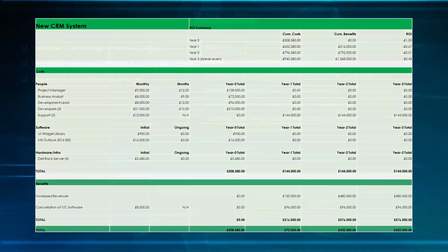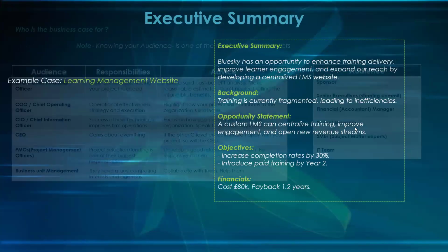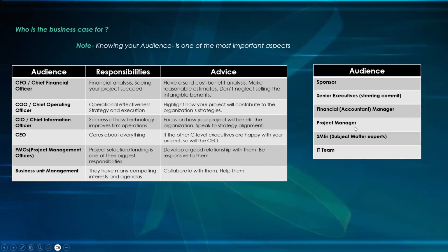As for yourself, your project manager, you guys are the ones pitching. Again, I forgot the PMO's office. The PMO's office is going to be the one to collect all the proposals from all those units and put them together. And once the business approves, they are going to be the ones monitoring the risks, the dependencies, and every other thing, to see if the project is going well.